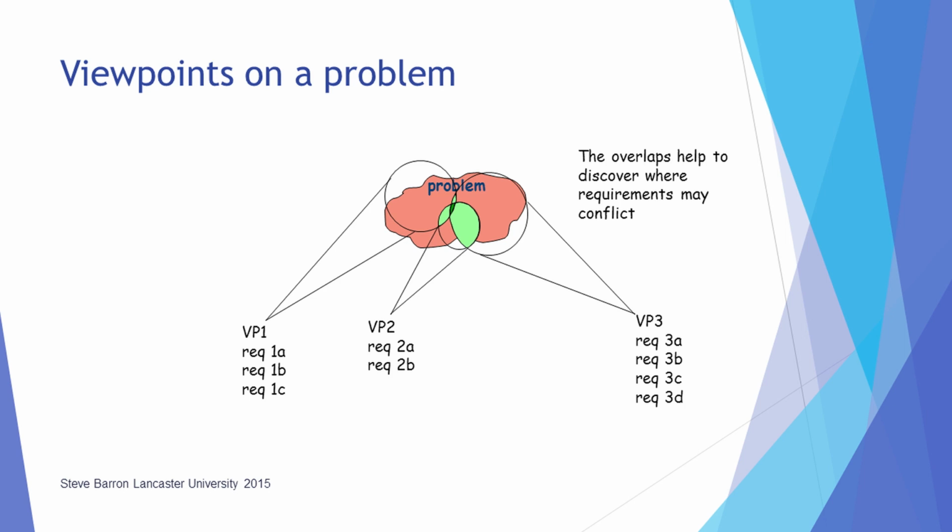A project manager should spend time on identifying and understanding these overlaps as a way to clarify more of the problem. As soon as a stakeholder is identified, it is important and urgent to understand their viewpoints of the problem. We should do this early in the project, before the problem has been assessed and agreed. However, if a stakeholder is not identified until later in the project, then it is still very important to involve this stakeholder immediately in order to understand their requirements. We might need to be prepared to modify the project, if necessary, to include any new changed requirements.